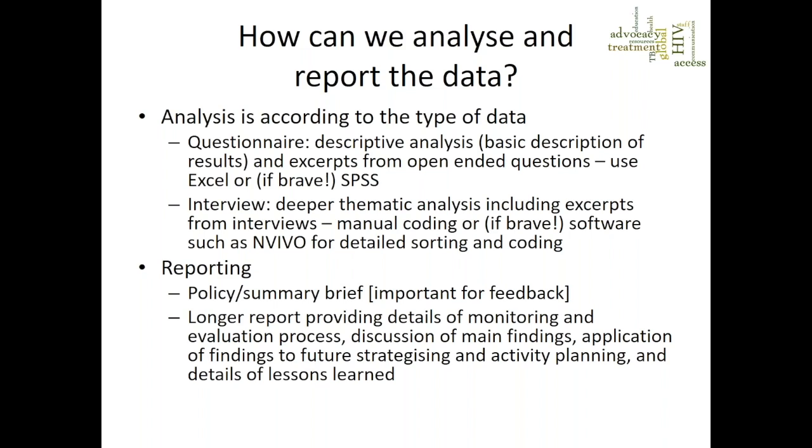And this can involve things like stories of significant change. Now, this is something I haven't spoken about, and I won't speak about anymore beyond this point. But the methodology for significant change is an interesting qualitative approach to evaluation, which does pick up impact on people. So it's when you talk to people and gather some information about how they may have accessed a project or been impacted by a project, and then ask them to tell you a story about a particular change that they think has come around as a direct result of attending a new project or a new service. And this can be really useful, because if you interview enough people, then you can have 20 or 30 stories about the impact on people's lives. And that can be a very interesting and rich qualitative approach to gathering information about impact.